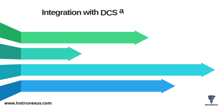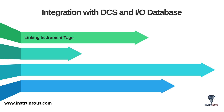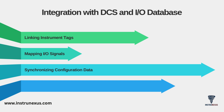The instrument index and the I/O list are two halves of the same brain. A key task is the integration with the DCS and I/O database. The instrument index contains all instruments, and the I/O list filters that list for only the instruments that connect to the control system. This integration involves linking the instrument tags from the index to the I/O list and mapping the I/O signals for those tags. This allows you to synchronize configuration data between the two documents, streamlining commissioning because the path from field device to operator screen is clear and verifiable.